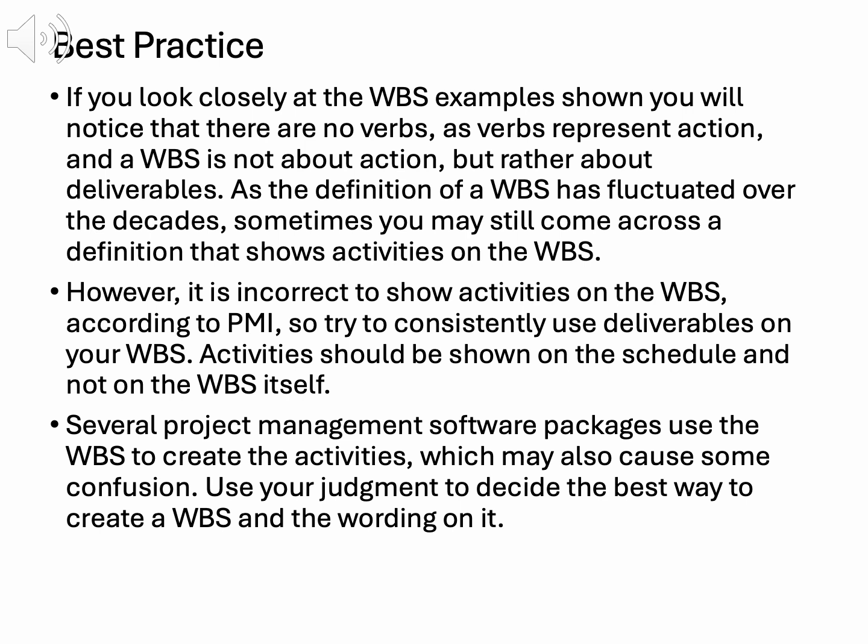Another best practice is team collaboration to define deliverables. Involve stakeholders to ensure the WBS reflects all requirements, like training needs in the just-in-time project. Start with high-level deliverables, refining into work packages, as we'll discuss next. This ensures completeness and buy-in. Avoid common errors, like including specifications or sequential steps. The WBS focuses on what's delivered, not how or when.